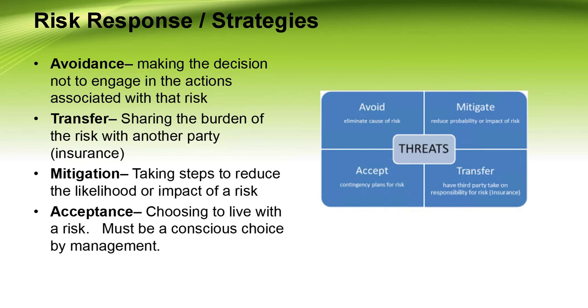Normally, formal risk management deals with the alignment of 4 potential responses to each identified risk. So, avoidance: this response eliminates the vulnerabilities that give rise to a particular risk. This is the most effective solution, but it often is not possible because of organizational requirements. For example, eliminating email to avoid the risk of email-borne viruses is an effective solution, but is not likely a realistic approach.